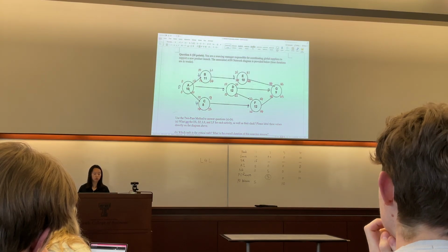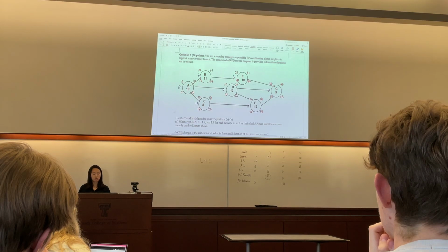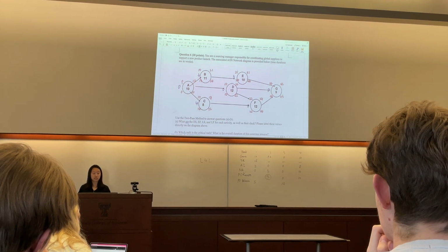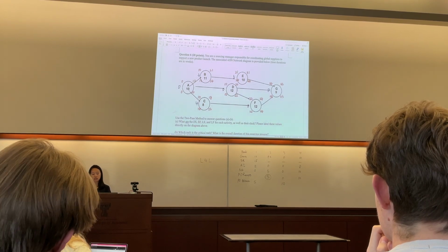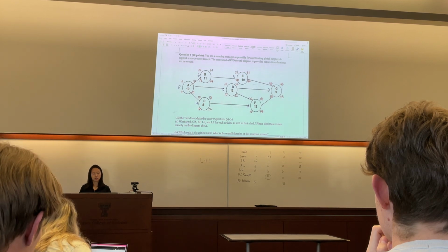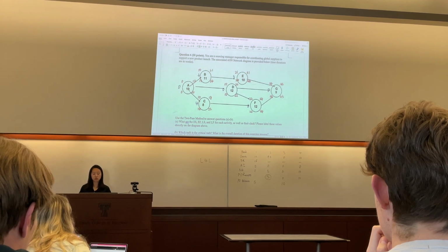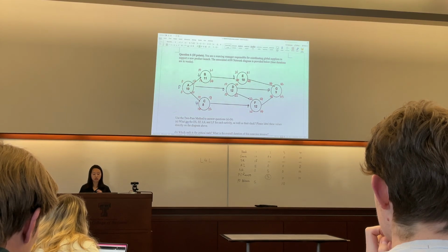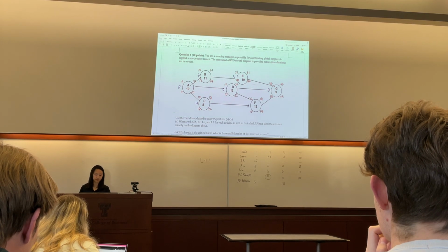So over here is node A. We can start right away in day 0 or week 0. So 0 is the earliest starting point for A. And A takes, let's just say, 10 days to finish. So 0 plus 10, we have 10 as the earliest finish date.